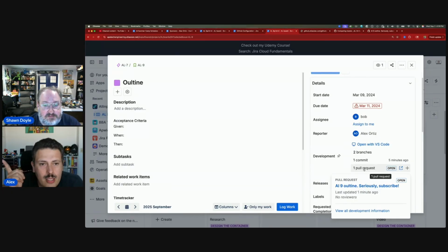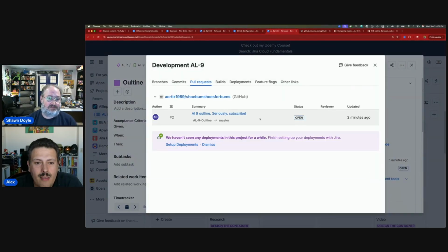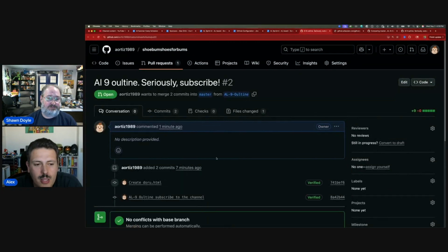But now this is where I'm watching these pull requests, because a pull request shouldn't be open for more than a day or two. It shouldn't be long lived. Right. So if you're looking at this on a Monday and by Wednesday you still have an open pull request, this is where you can click on this stuff and figure out who has the PR. Normally inside your PR, you would have your reviewers here on the right hand side, so you know who to go and talk to without having to bother that developer.